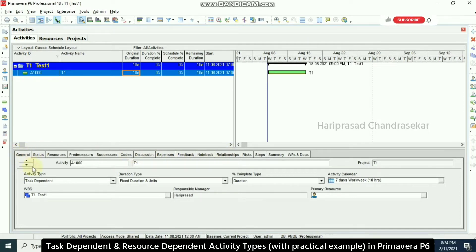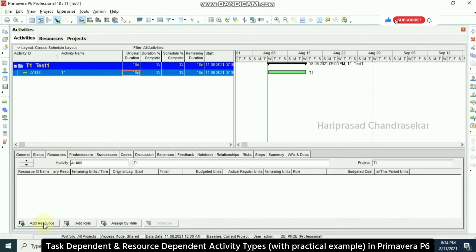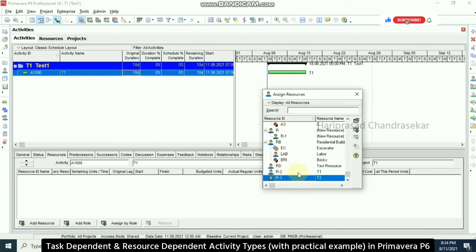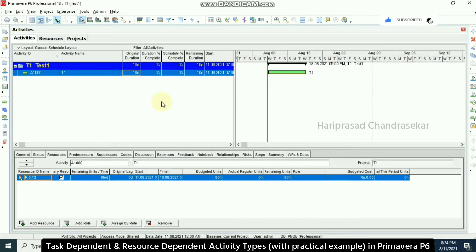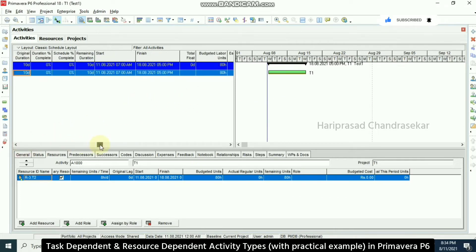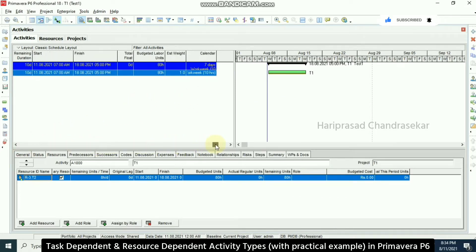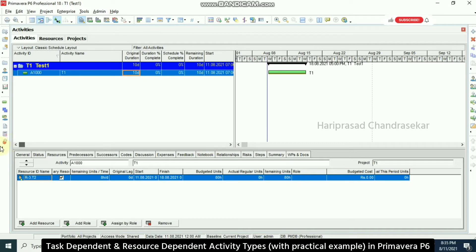Going back to the activity, under General it is set to task dependent by default. Now going to Resources, I add the resource we just created and assign it to this activity.